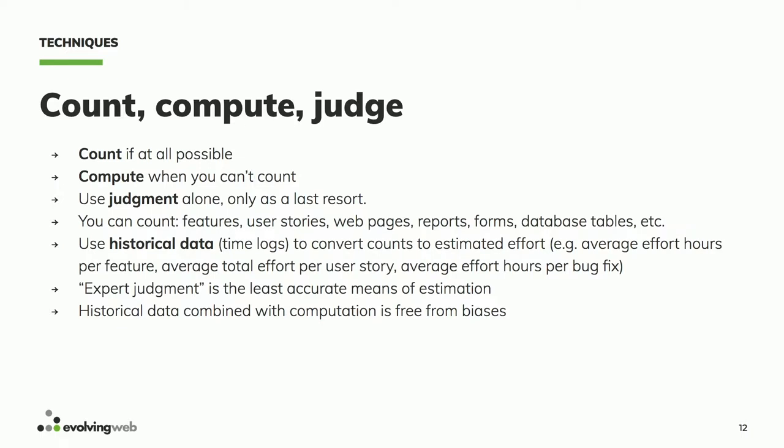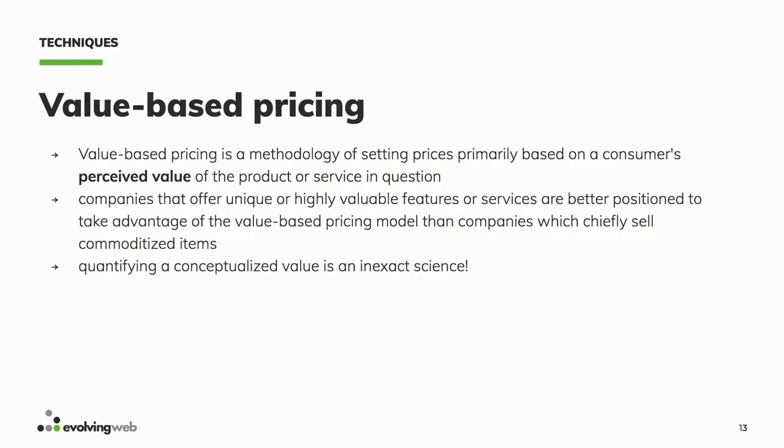And so we get to look at the previous projects that seem the same according to those indexes, and then say, well, that one took 1,500 hours, even though we only estimated 1,200. Or that one took 400, it was fine. So this is what it means to check your judgment using metrics.